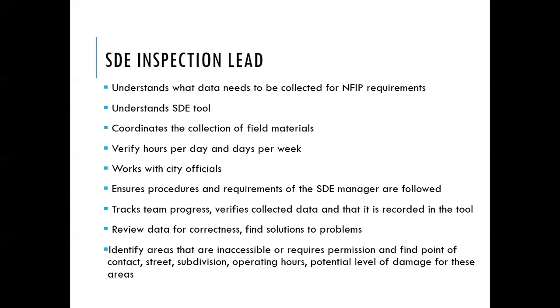Of course, verify the hours per day and days per week, because we want to set that target date for finishing the collection and getting the assessments out as fast as possible. Ensure procedures and requirements are being followed, and that everyone has their identification with them. Make sure they're collecting all of the field data and really taking a good look at the different levels of damage. Track the team's progress and verify that the collected data is recorded in the tool. That may also be where the data management and quality assurance work is done. Then review that data for correctness and find solutions to problems, because it could really delay you if you miss something or it has to be corrected.